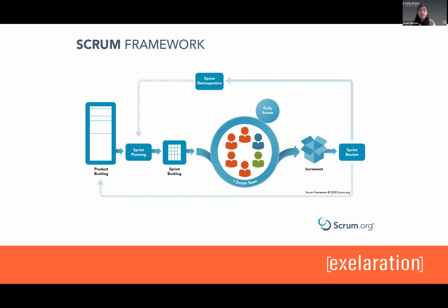We take it a step further, and oftentimes people will invite stakeholders. So who is our end user? I can be a product owner and know what the product needs to be, but I could not use it every day. For example, I was a development team that developed software for an operations team. So we would have folks from the operations team come to our sprint review and ask, is this something that will actually work for you guys going forward?